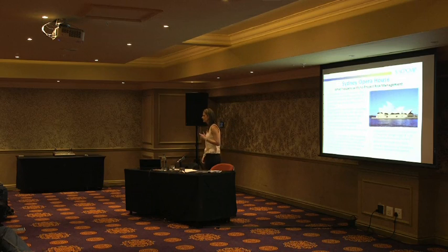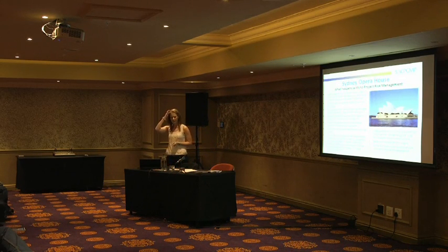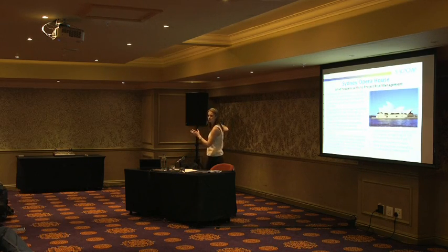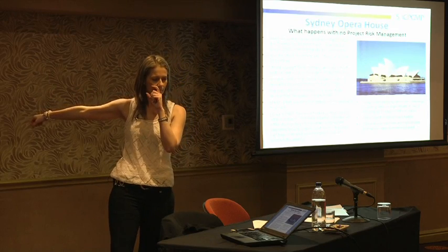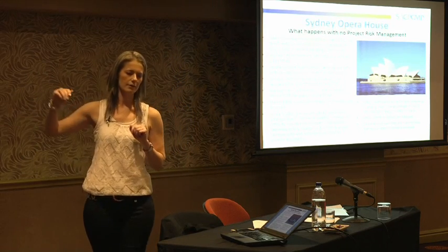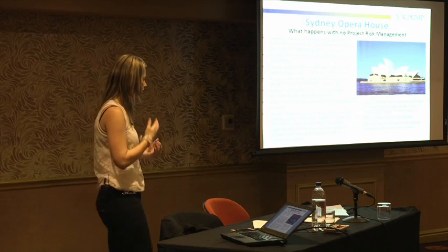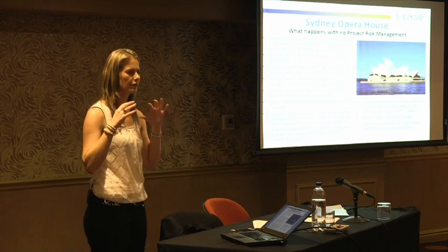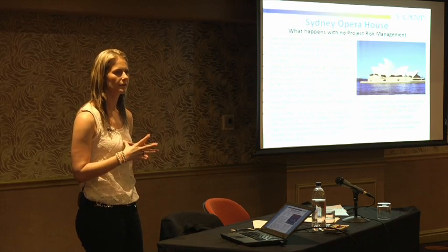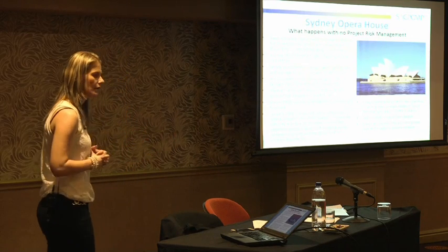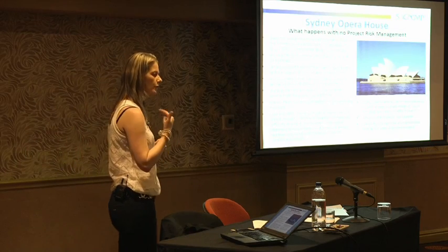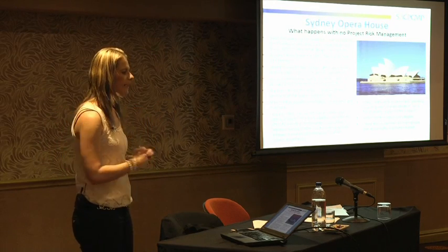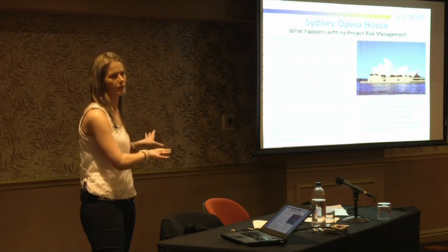The problem is, by the time they get to a 70% model review, they go, well, actually, if we want to do this, then we've got to change something that we've started already. And it happens time and time again on construction, that when the engineering starts changing, we start issuing revisions, red lines are being done in the field, the amount of trouble it causes within a project construction environment is sometimes devastating. It has your compensation events, so it will cost you time, it will cost you money, of which the contractor will probably be liable. And we've started the project wrong in that sense.